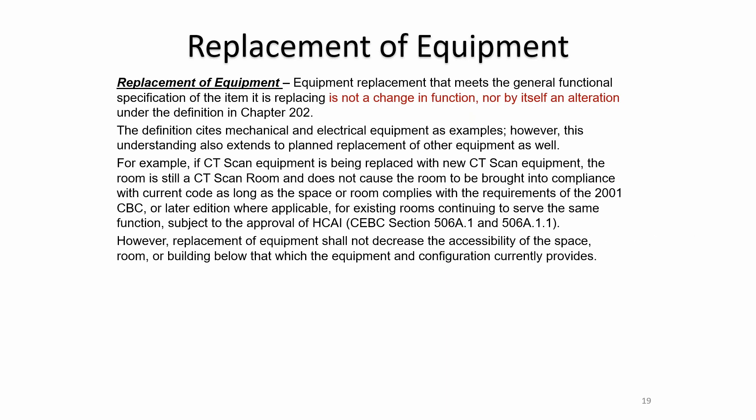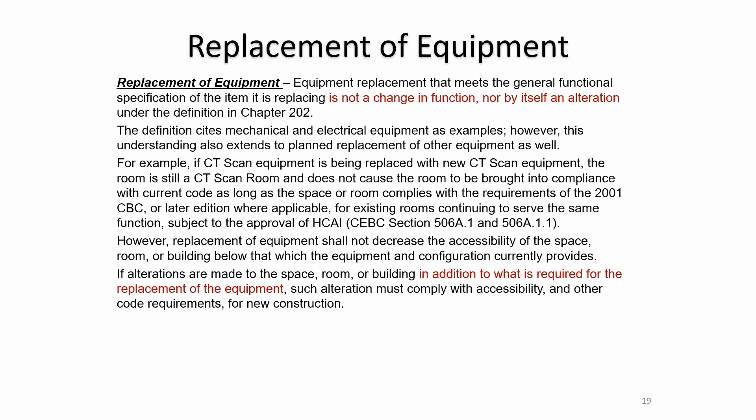However, replacement of equipment shall not decrease the accessibility of the space, room, or building below what the current equipment configuration provides. If a new CT scanner is larger in footprint than the one it's replacing and no longer meets the clearance requirements in the room, the room would be forced to be larger — which would trigger accessibility because you're now being forced to move walls. Any alterations made in addition to what is required for equipment replacement must comply with accessibility requirements for new construction.